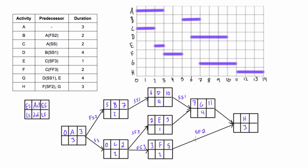Seven plus four gives us an earliest finish of eleven for G. Looking at activity H, its earliest start according to F is based on start-to-finish with lag two - so H could finish two days after F starts, giving a finish of five, and subtracting three gives a potential start of two. But according to G, it's a regular finish-to-start, so we could also have eleven. Eleven is greater than two, so eleven wins. We put eleven as the early start of H, and adding three gives us fourteen for our project duration.